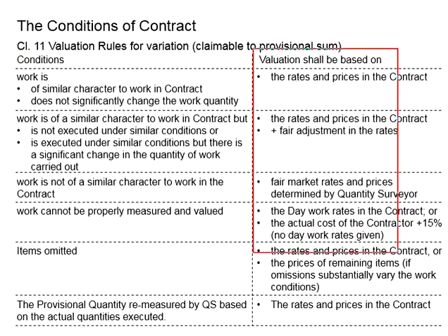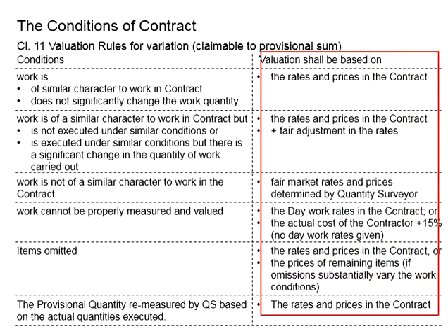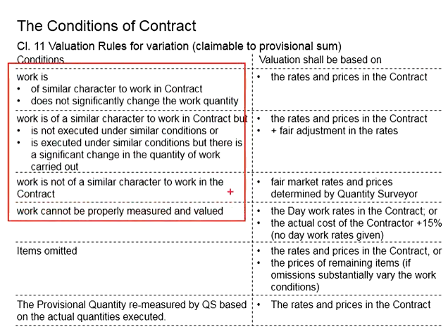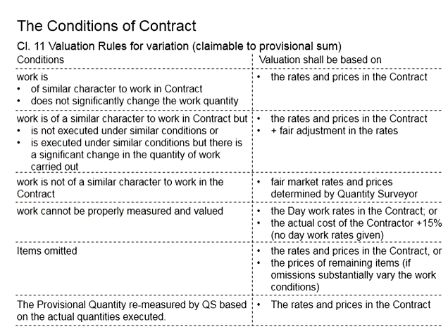These rules of valuations have been made transparent to the contractors and the employer, on the basis of the guidance as per the price and the rate which was initially agreed in the contract when there are similar characters and similar natures of the works, so that the contractor can charge reasonably to the employer without taking advantage over the employer.